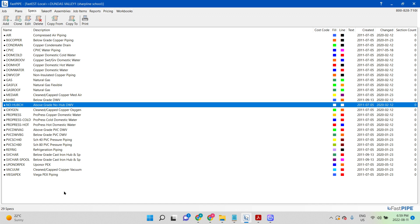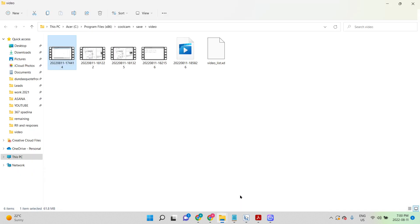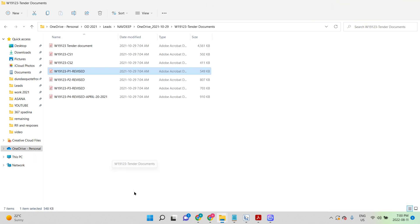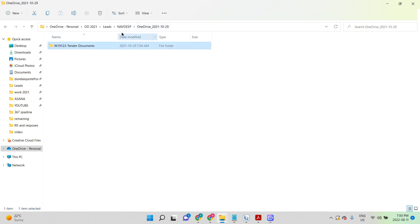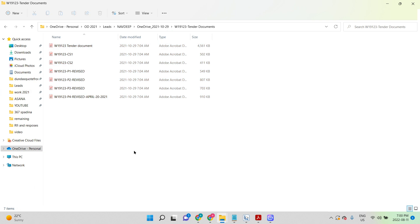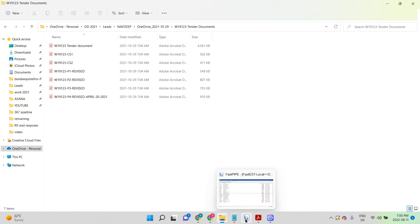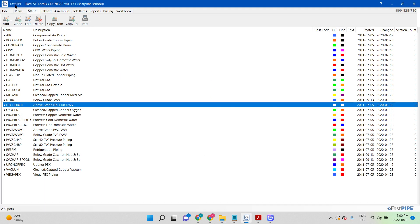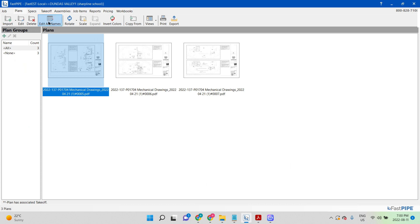The way to do this is: first you download the drawings from the email and organize them - which I will show, but it's pretty easy. For example, this is one of the jobs for my clients and all the pictures are here. I've downloaded them and organized them so I can do a better job working on it. After that I download the plans in here, scale them, and I'm ready for takeoff.